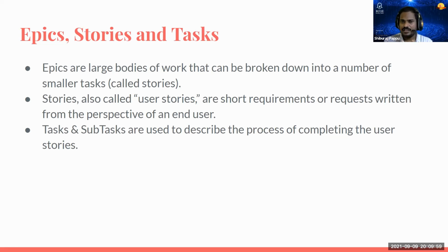For example, I take a College Management System, and this is my project. In that there will be user management, like login, register, password reset, right? All this comes under user management. So user management will be my epic. An epic is basically a group of tasks which forms a complete module.